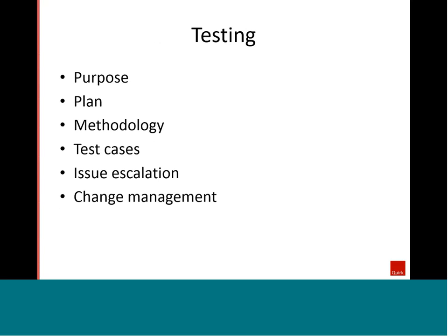The other key piece of doing an upgrade is testing. The primary purpose is to see whether the application is working as desired, and also if it meets the stakeholders' needs. Ideally, you're testing based on a well-written plan, which gives you the different test scenarios that you need to be able to test, and also it gives you timelines in terms of what you need to accomplish by when.